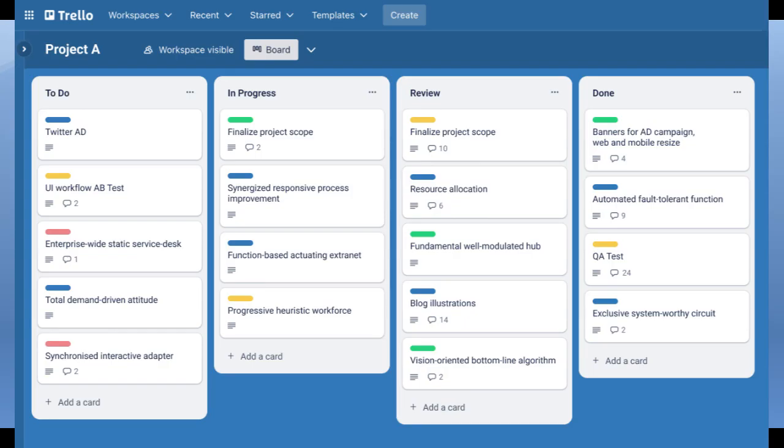Let me give an example here. For example, the customer can sign up into the e-commerce solution. So what are the tasks here? Obviously tasks related to software development. For example, you have to design the screens, modify the database tables, do the testing, and do the deployment. All such tasks are available, and you can break down the feature into tasks. So team members can create, assign, and track tasks, ensuring a granular view of the work to be done.